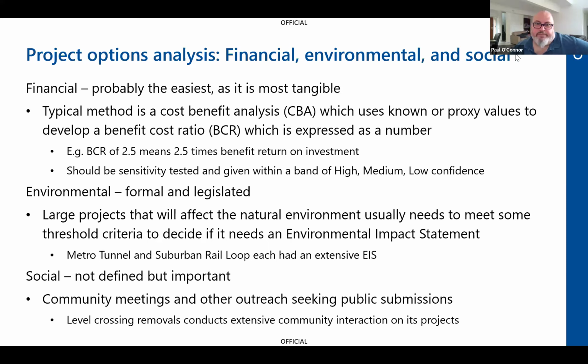Because the Metro Tunnel was proposing to dig a massive cavern and some large shafts to access that cavern, that would attract that contaminated subsurface water into the void, because water seeks a void.